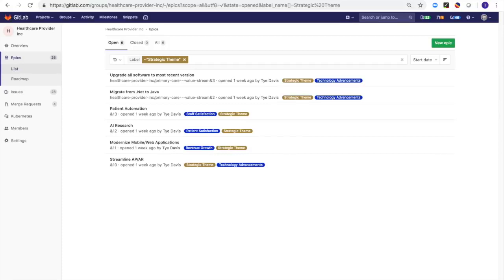What will happen is these portfolio epics can be taken and broken down into features or enablers, and then broken down more into issues from there. They could be part of PI planning, where we take those features and enablers, break them down, like I just mentioned, into issues, and then create PI objectives out of those. Again, this is just demo data, so we have only a few listed here, but in a real organization there'd probably be quite a few more portfolio epics.